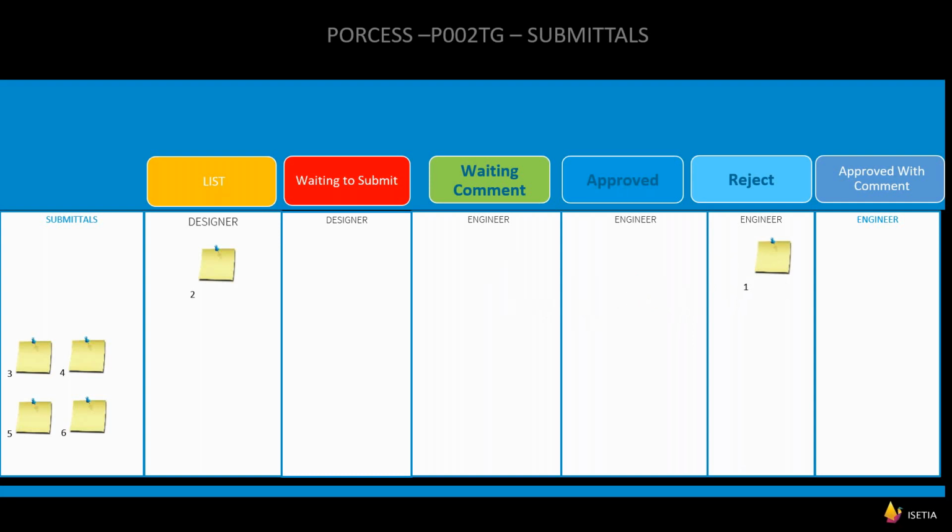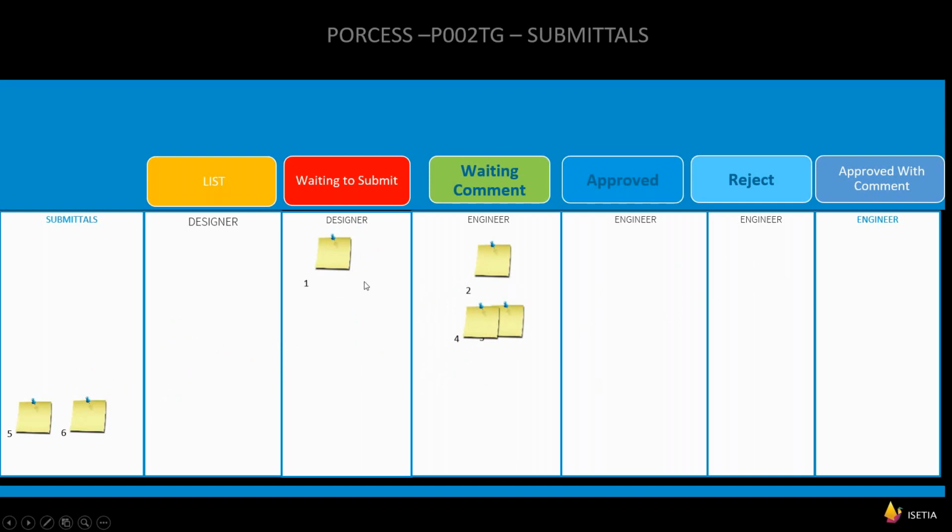Let's say our document which we submit is rejected by the engineer and comes back to this point. At the same time, document 2 and document 3 have processes ongoing. As I mentioned, sometimes we can have millions of documents with status tracking at the same time. Engineer rejection brings the package back to submittal, and we move our activities from left to right. If you look at this board from a reporting perspective, it immediately gives you a status report.